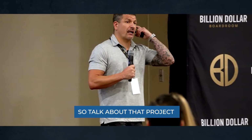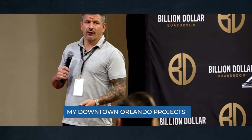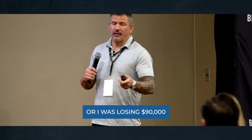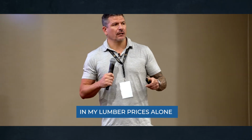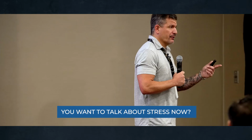So to talk about that project and the fluctuations in market prices, my downtown Orlando projects, you guys can drive by it, lock the door. I lost $90,000, or I was losing $90,000 in my lumber prices alone, because the lumber went up that high. Then I had a 7-month delay because of my trusses. You want to talk about stress?